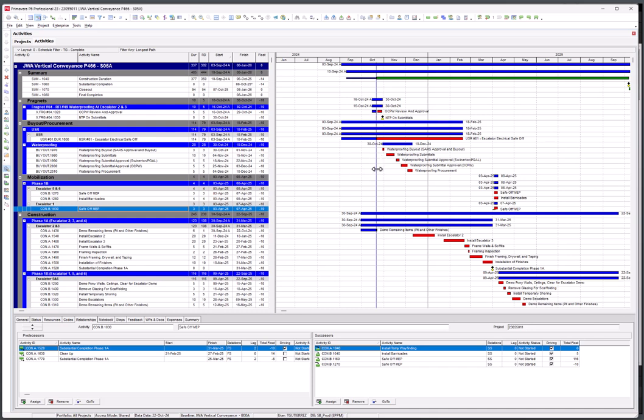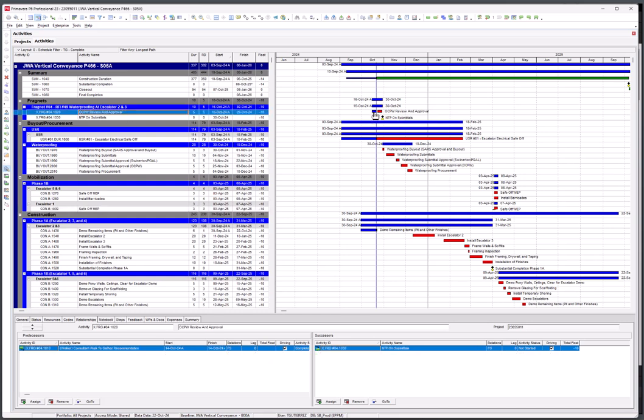The blue line here is your data date. So anything on the longest path that's on that blue line is your most critical thing on the job. So in this case, if I look here, blue line here, this activity here, OCPW review and approve, that's what's triggering my longest path on my job, or at least one of them. All right, so I'm going to list this here. So this is OCPW review and approve. I need them to review RFI number 49 for waterproofing.